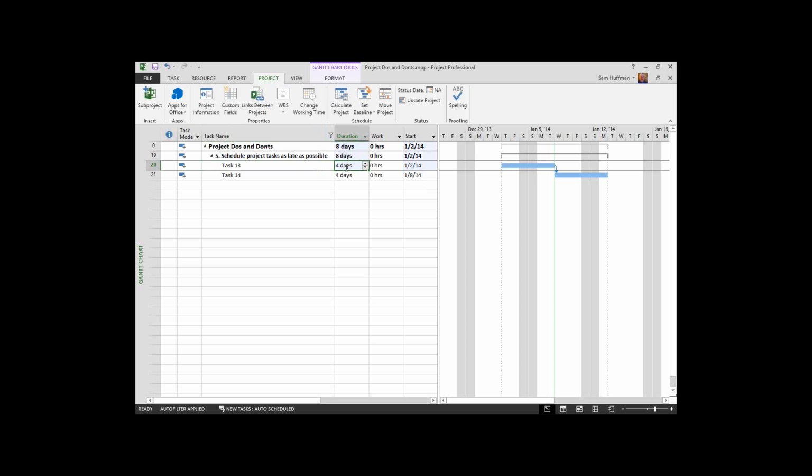You seeing this? We're scheduling this way, that is to say, starting from the finish date and calculating start dates. So we'll start here and go to here. This determines the finish of the previous task. The duration then determines the late start date for each task to hit its latest finish date.